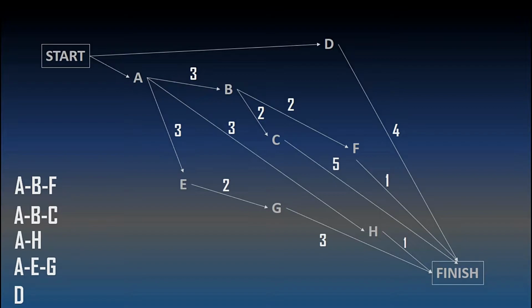Now, if we add the number of times in all of these different timelines, we get the results. The longest route is going to be the time it is going to take the overall project to be completed, and that would be 10 weeks. And the timeline is ABC. Simple. This example is a really easy one.